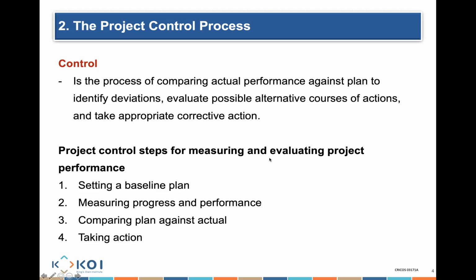Now, the project control steps don't just happen like this. There are steps we need to follow. And these steps really relate to everything I've been explaining to you for many, many weeks from the beginning till now. We need to understand the charter, we need to create the scope, we need to create a work breakdown structure, we need to create the scheduling, we need to create a budget. All of these are step-by-step things that we needed to do to really reach this stage of being able to monitor how we are actually performing.